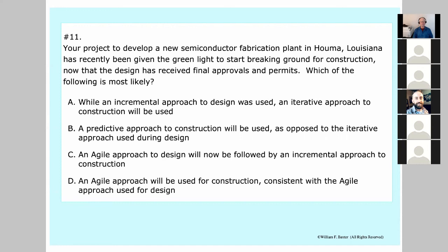So we're going to use a predictive approach during construction as opposed to the iterative approach used during design. Exactly right. So during construction, the cost of change will be very high, so we need to be predictive by then. And during design, we can go through these design iterations to reach an agreement on a design. Very good.